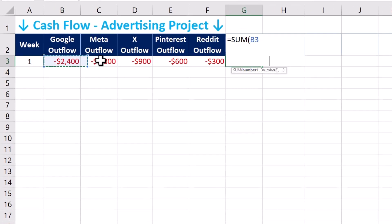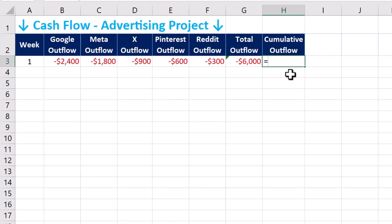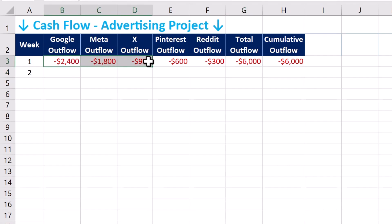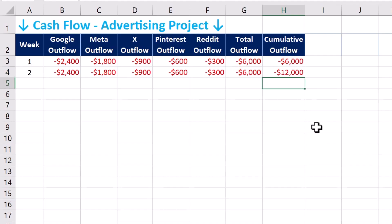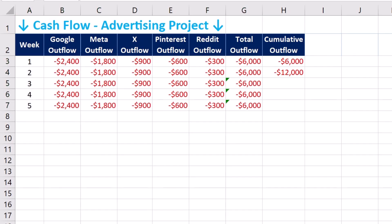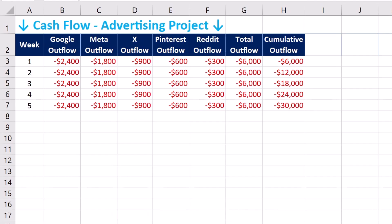The total outflow for week 1 is calculated by summing up the expenditure across the five platforms. The cumulative column shows the running total, equal to minus $6,000 in week 1. We have the same amount of cash spent in week 2. Cumulative outflow is defined by summing the previous week's figure and the total outflow of the current week. We can duplicate the values for weeks 3 to 5, and by week 6 we reach minus $30,000 — the total budget for our CPA advertising campaign.